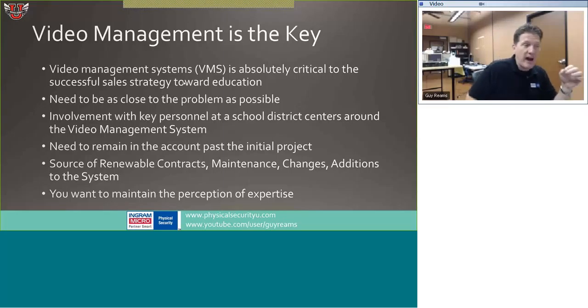Because I've been burned by this. Customer goes out and buys a PTZ camera or recommends a PTZ camera, or some organization comes in and convinces the customer this is the greatest PTZ camera ever. They buy it, or they put it in their general contractor's bid instructions, and they end up getting 15 of these PTZ cameras, and then I'm the one that has to break it to the customer. Oh, Mr. Customer, the PTZ camera doesn't work yet with your VMS, and then they get all bent out of shape and upset about it. So start with the VMS.